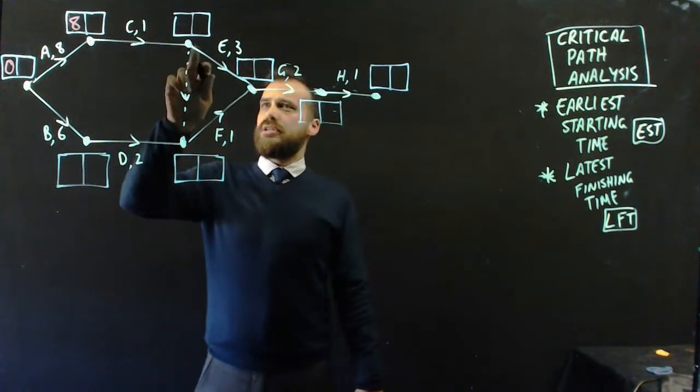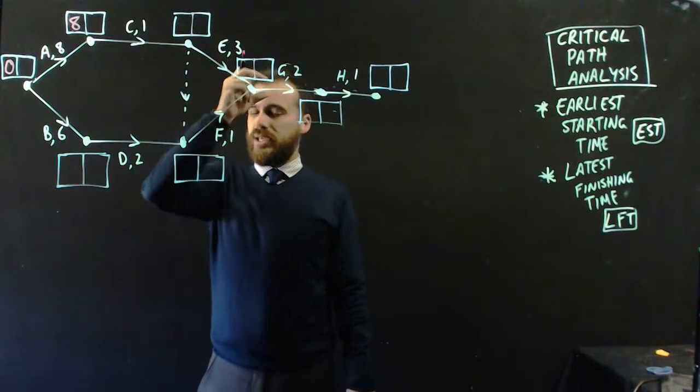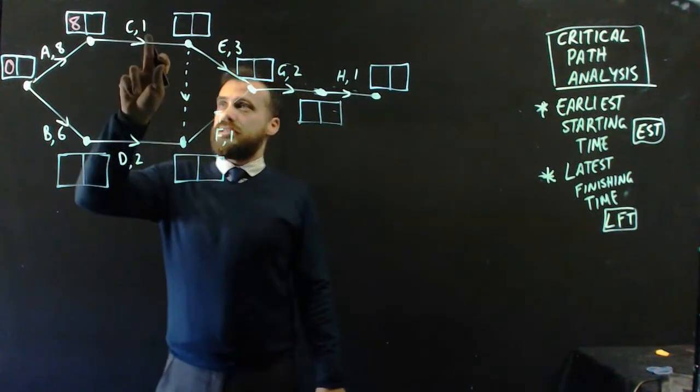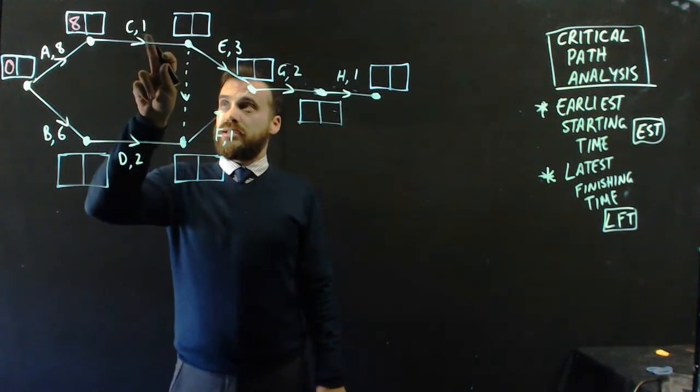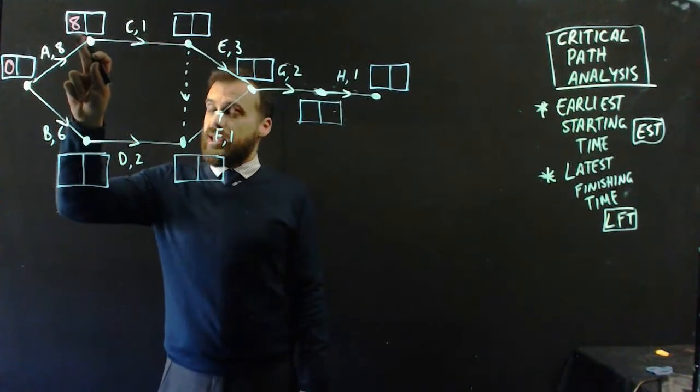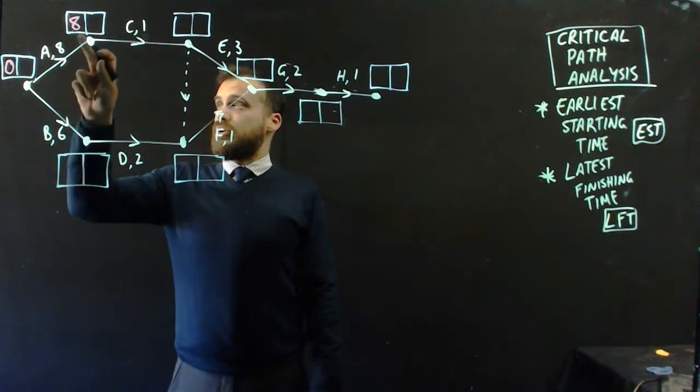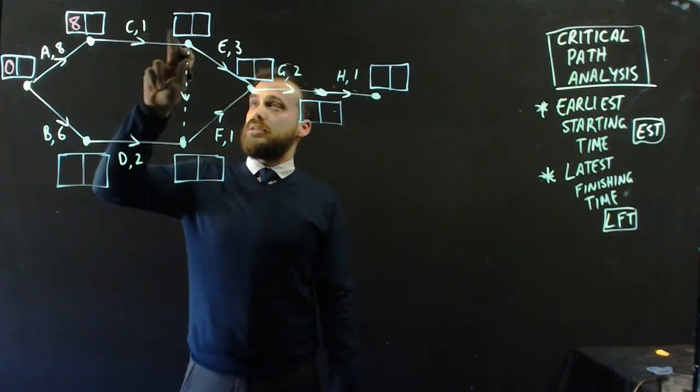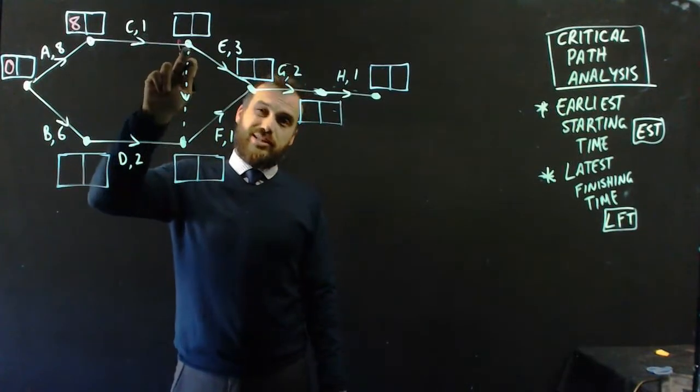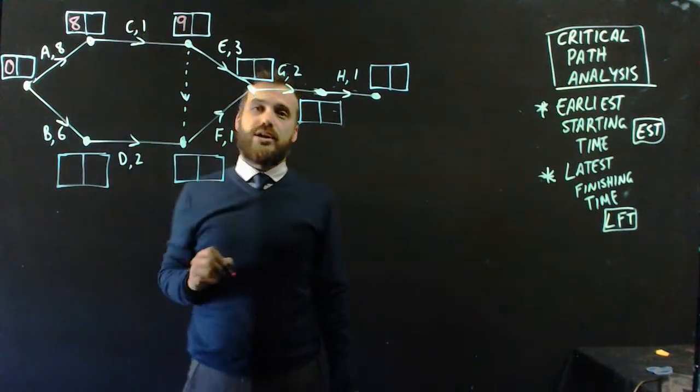Now what's the earliest that E can start? Well, E has to wait until C is finished. Now C takes one hour. C can't start until eight hours has elapsed. So eight plus one is nine. It's going to take us nine hours to get to this point, so we can put a little nine in here.